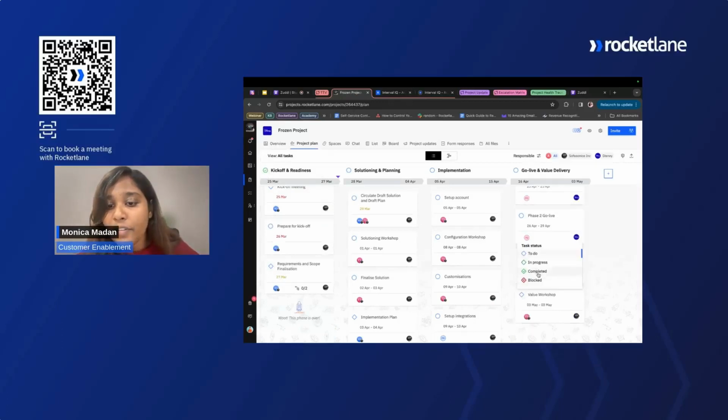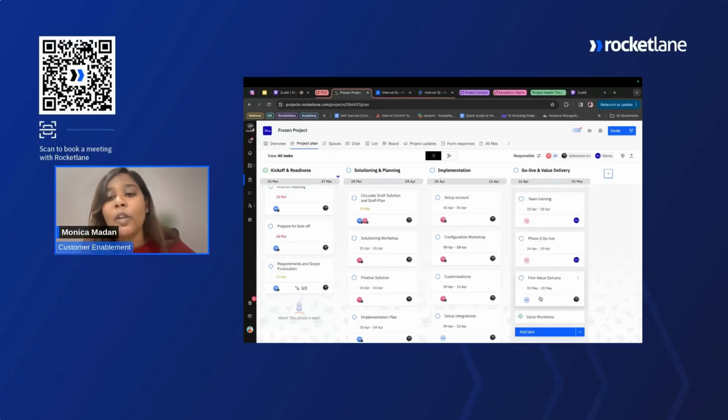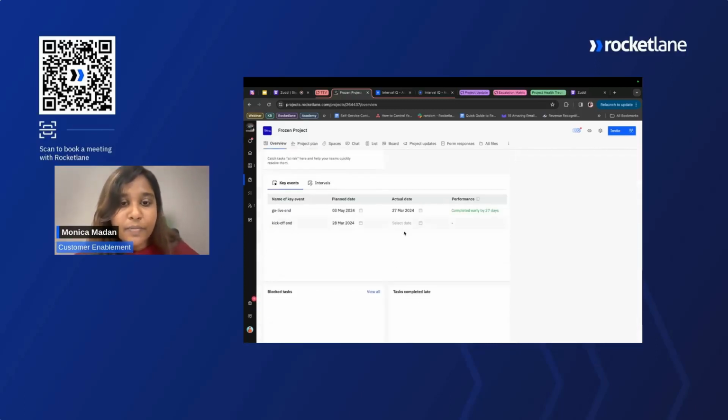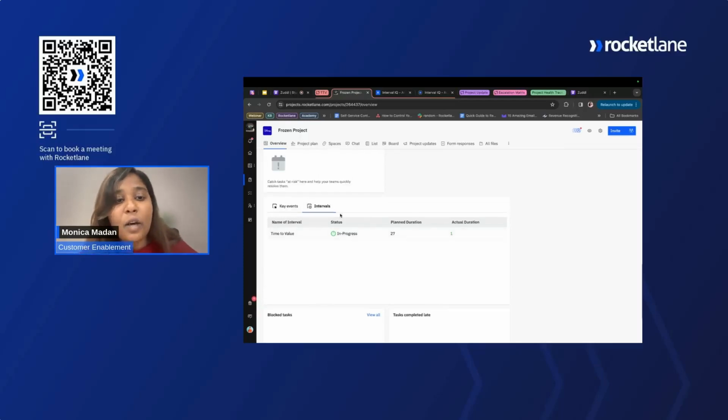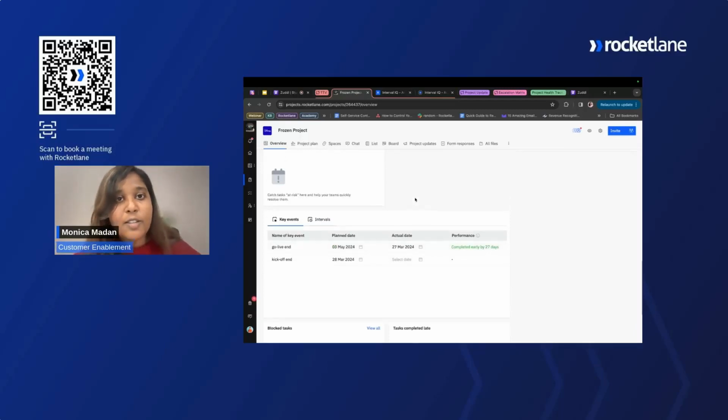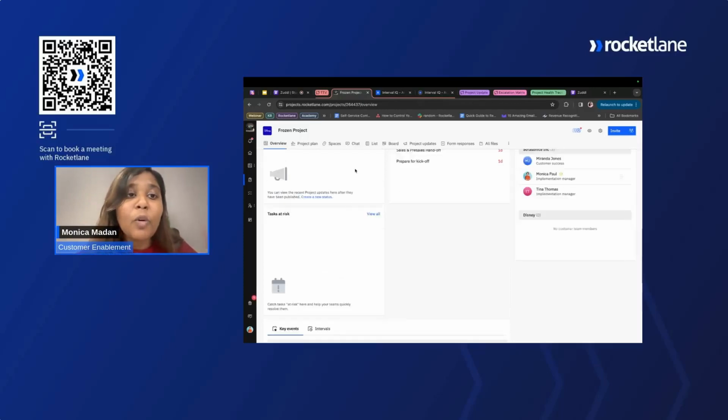And this is where if I say completed, it means that my go live is also completed. So I've changed the dates here. If I go to overview, you can see that my go live end was completed 27 days early, and my time to value is also getting updated. So that's how easily you can capture the key events and update the delays or the early completion of your milestones. So that's basically how you do it for one project.